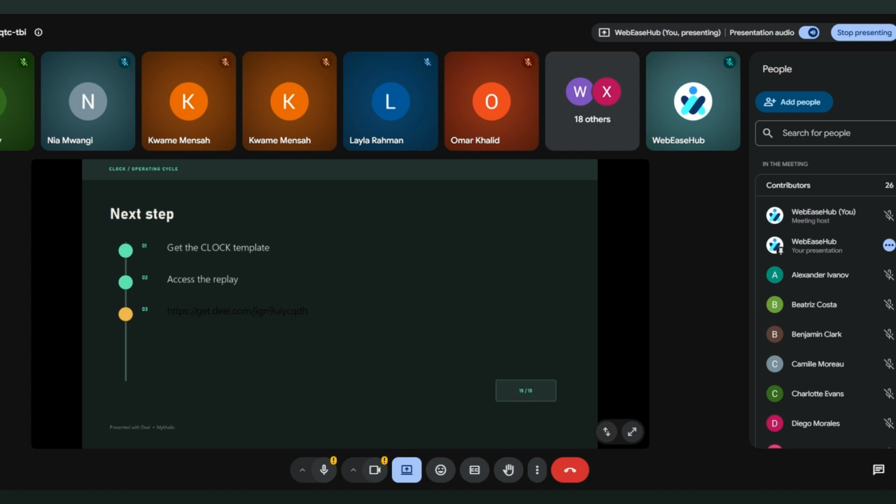Here is one illustrative monthly flow. By the 10th, managers submit routine changes and required inputs. The people ops owner is accountable for making sure managers know what is needed and for escalating missing submissions before they become late. By the 12th, people ops completes validation. This means requests are not merely submitted, they are sufficiently complete, internally reviewed, and ready for the next step.